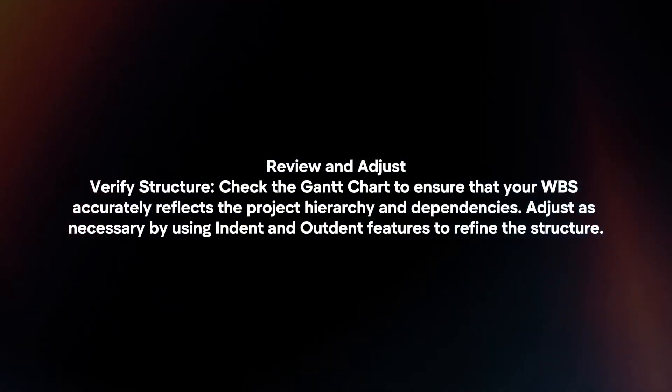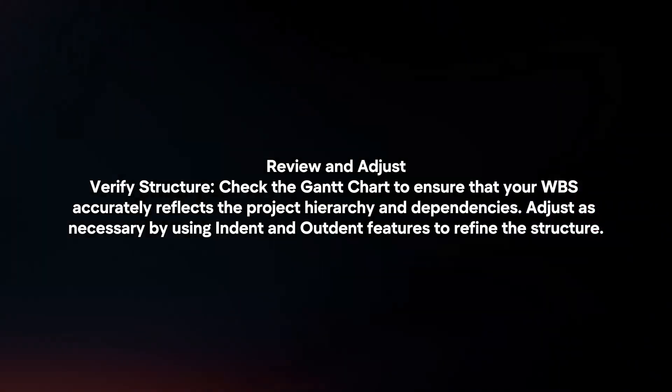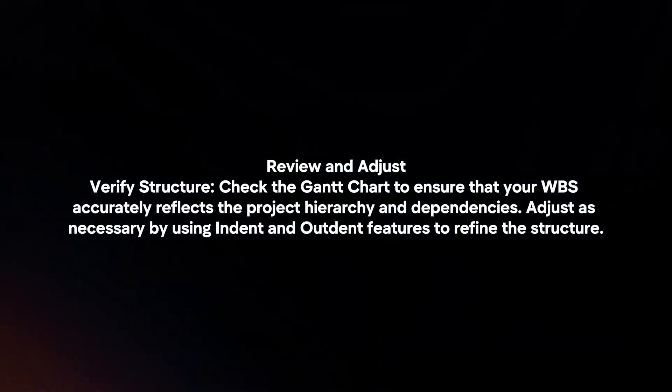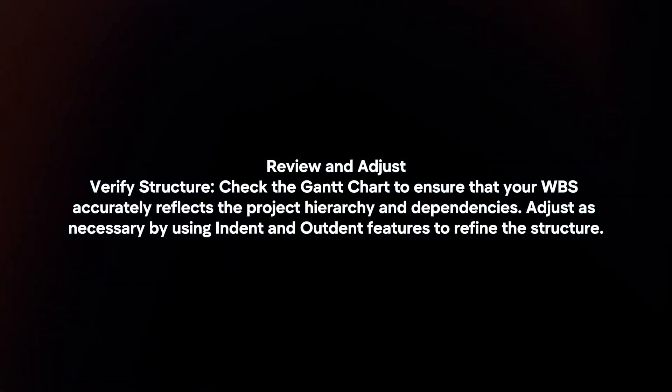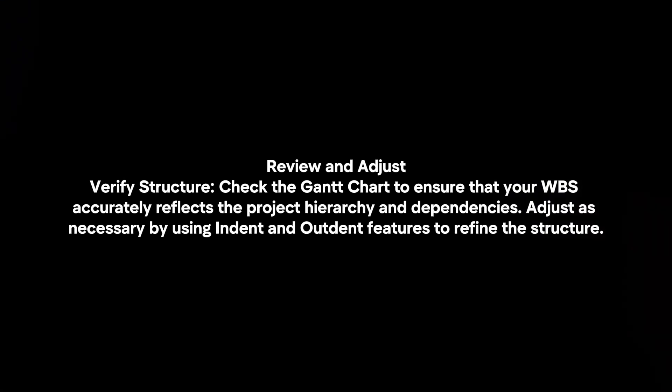Review and adjust. Check the Gantt chart to ensure that your WBS accurately reflects the project hierarchy and dependencies. Adjust as necessary by using the indent and outdent features to refine the structure.